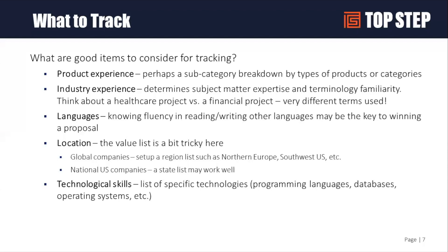Location is something people want to track because when you're scheduling resources and trying to find the best fit, it's great to say: if I have a choice between two people, which person is closer? That'll be less expensive to send on travel, so it's less cost to the customer. The only problem with location is there are a lot of locations in the world, so it's pretty hard to get a comprehensive list. Location tends to be tracked at a higher level — maybe what office you report to, or whether you're on the east or west coast of the US, or what country in Europe.